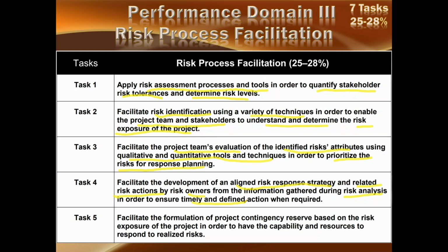So you must have an aligned risk response strategy and the related risk actions to be taken by the risk owners, which you have already assigned, from the information gathered during the risk analysis you have done, the qualitative analysis you have done, that has enriched you how and what to do about this risk to ensure timely and defined action. So through analysis, you have come to the understanding what is to be done with this risk, who is the risk owner, and the overall risk response strategy is in my mind, and now I have to guide the timely and defined action when the risk is about to occur.